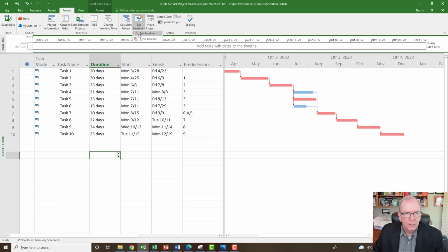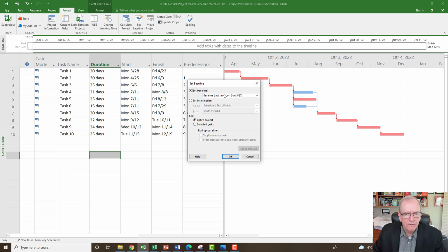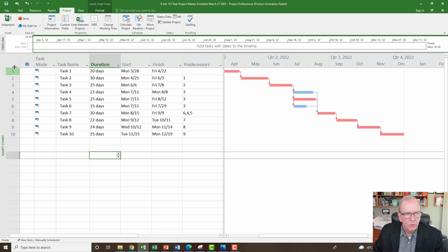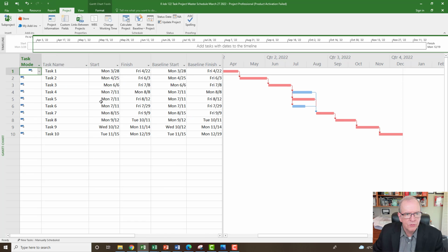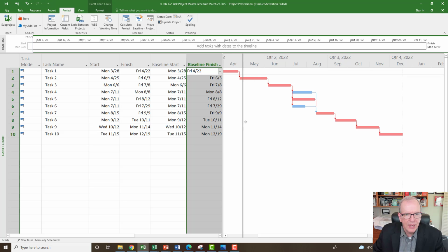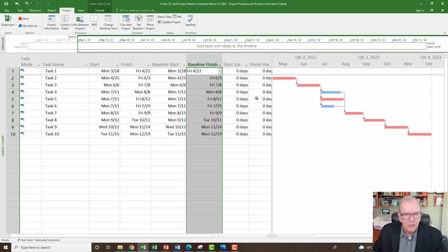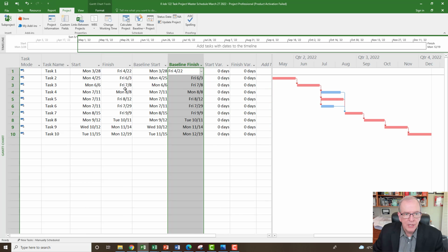If I go back and it says last saved, I know it was already saved. I would also see, if I click on the square icon box and go to the variance screen, these filled in. Otherwise, it would just say NA, as non-applicable. This way I can track my variances on the project as we make changes.